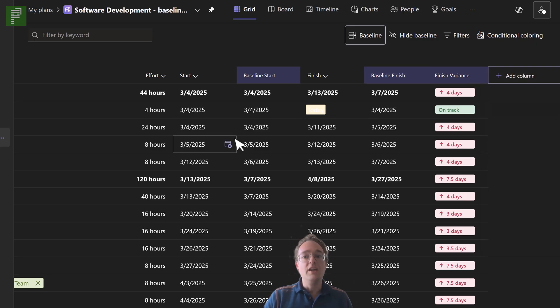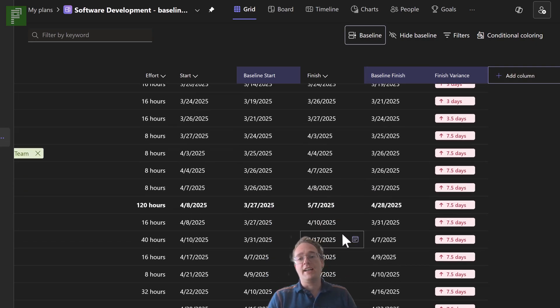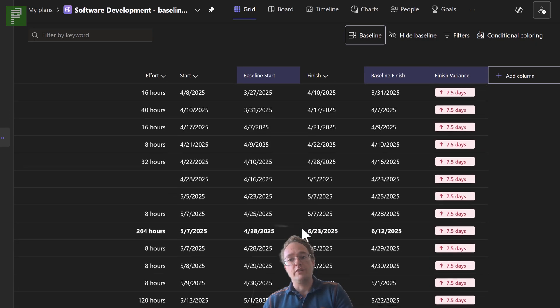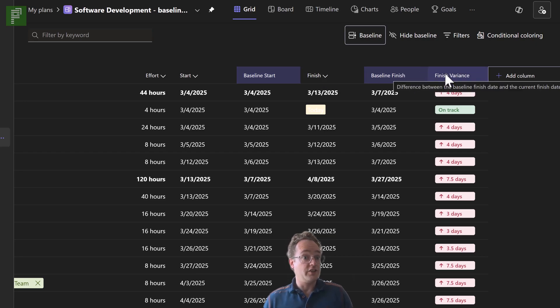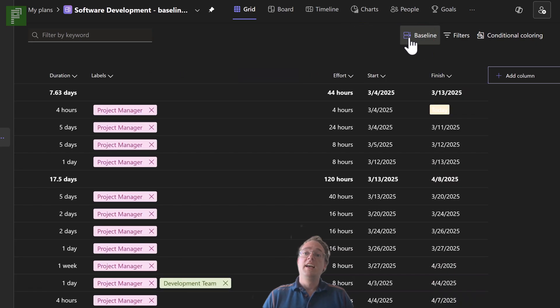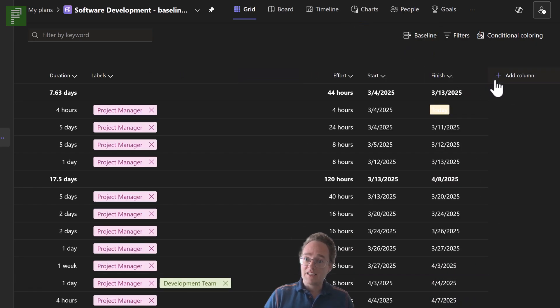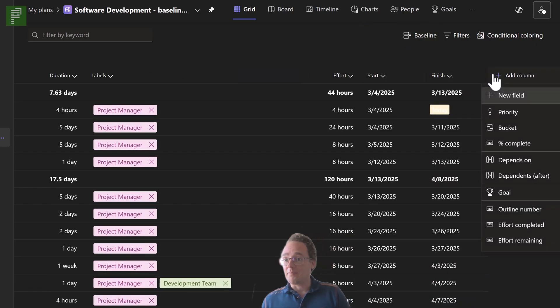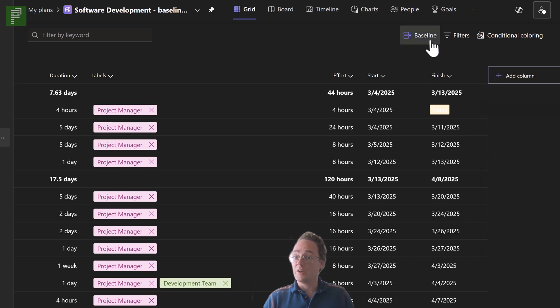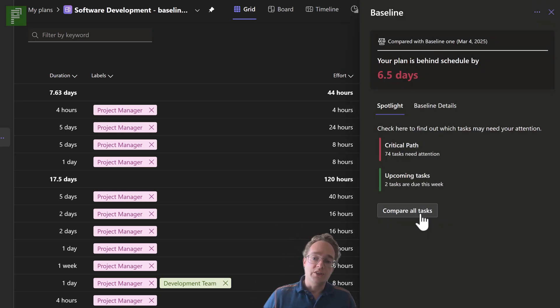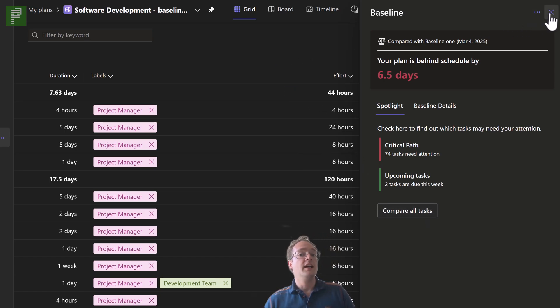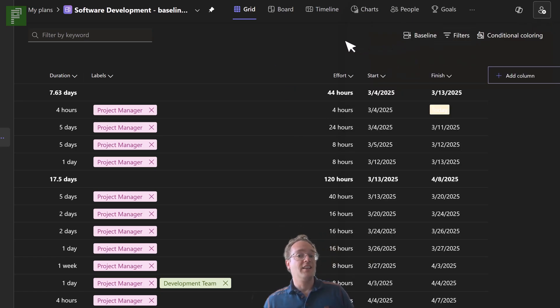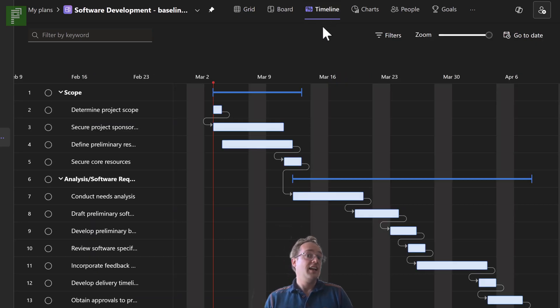Sadly though, we do not have the option to add the effort variance because work variance is also very important, especially for earned value management perspectives. There's an option to hide the baseline, but how to get that back? You need to go to the baseline and you'll need to go to the compare all tasks. So that is the way that you can get the baseline features back into your grid.